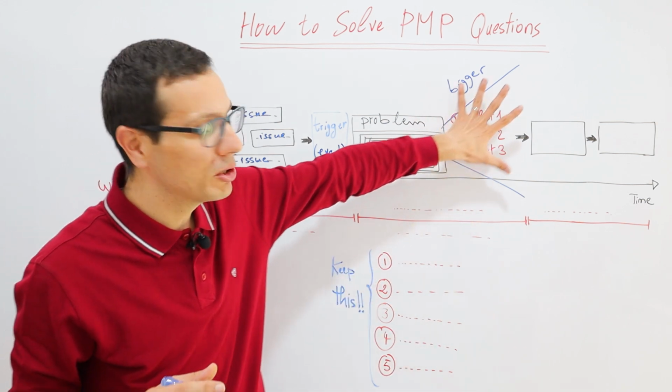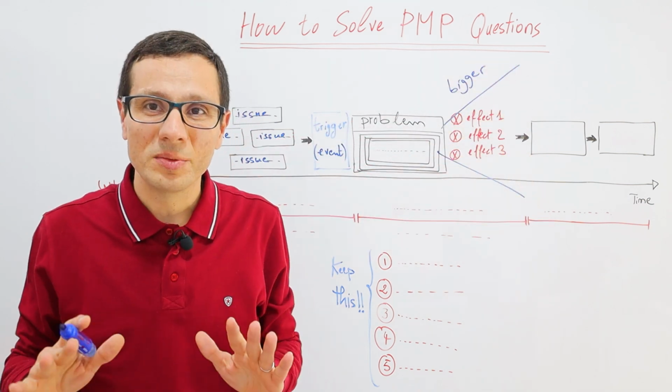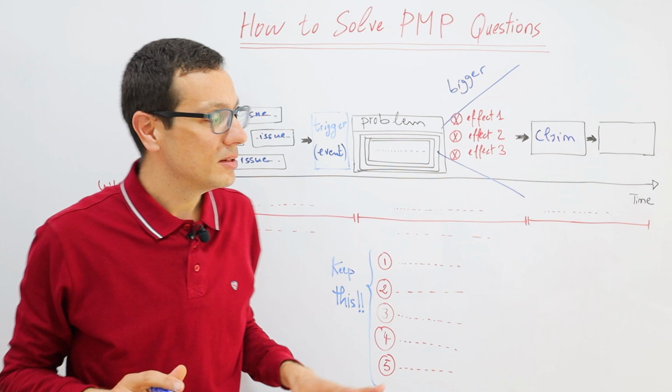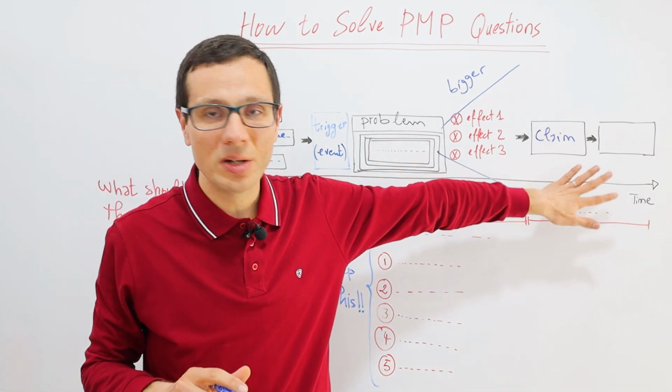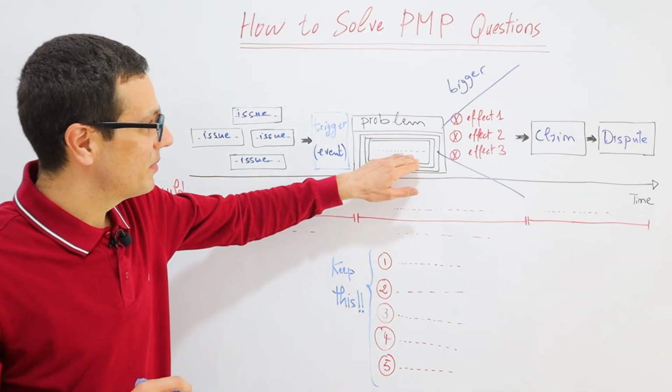These will not be increasing to infinity. At a certain time, the customer will submit a claim, and if the claim is not resolved, it will become a dispute.